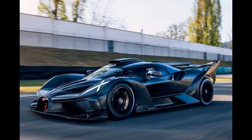Potential drawbacks: increased project timeline, estimated 6 to 8 weeks due to lack of specialized experience. This could delay the racing season if not completed in time for the next major event, scheduled in 8 weeks. Higher risk of errors during the rebuild process, potentially leading to engine damage and higher overall costs. Estimated risk of 15% chance of engine damage costing an additional $15,000 for repairs at LJRC's shop, or even more if a complete rebuild becomes necessary.